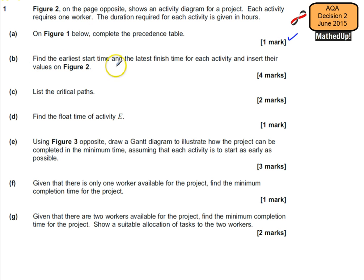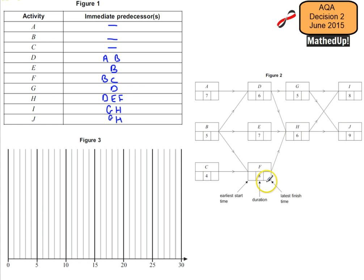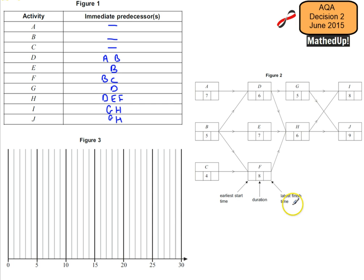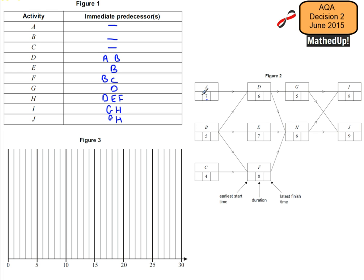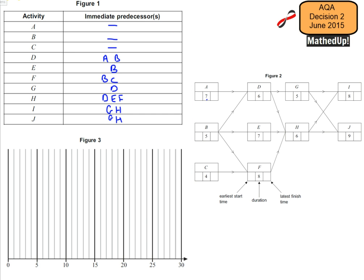Part B says find the earliest start time and the latest finish time for each activity, and insert their values in figure 2. This value here is the earliest start time, this value is the latest finish time, and the middle value tells us the duration. A, B, and C all have an earliest start time of 0.